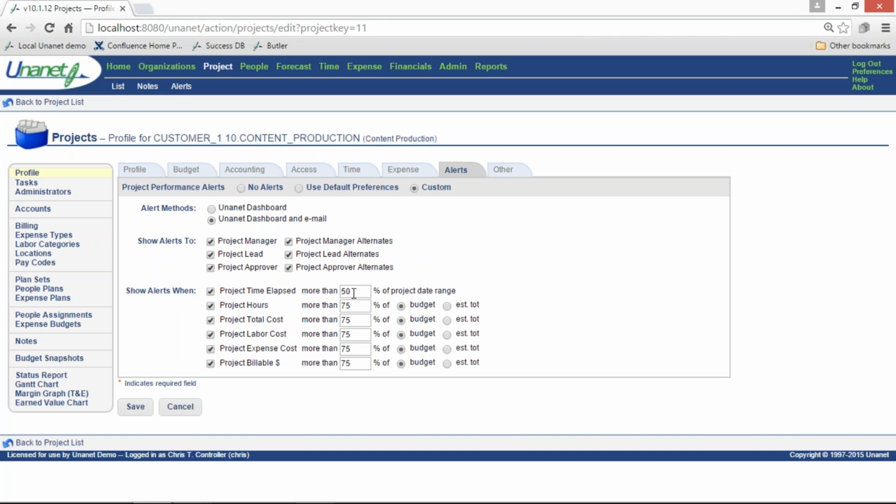It really is a reporting mechanism triggered when the budget items are input in the system and these percentages are met, and it's a great way to see those and let the project manager know you are at these different thresholds. And the project manager can then come in and set them to 85% or 95% to keep monitoring that, and it's an automatic trigger in the system.